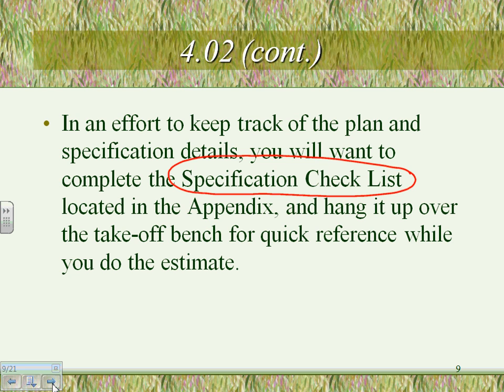Remember how we said, guys, the labor unit is 1 hour to install this fixture. That depends on normal conditions with normal people and so forth. So you need to adjust this one. It gives me an idea that I need to do some adjustment for my project. This is a nice checklist to keep track of. Building conditions, change orders, blah, blah, blah. Read through all of them.